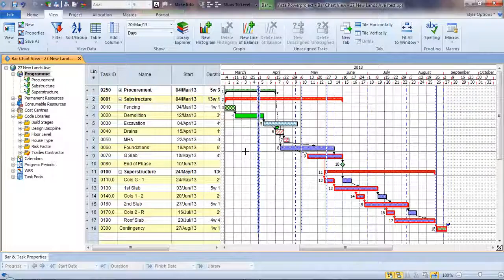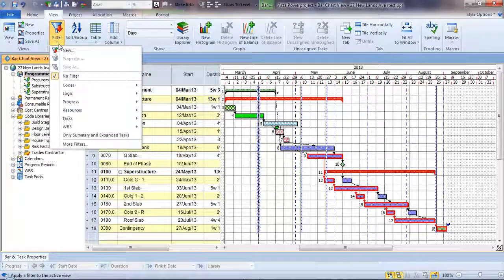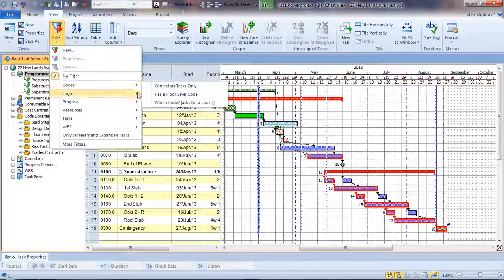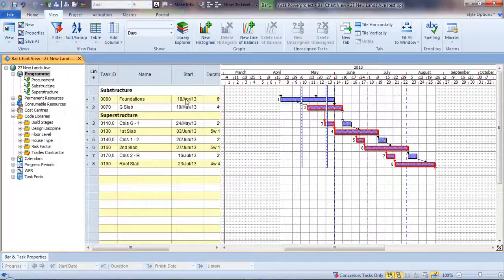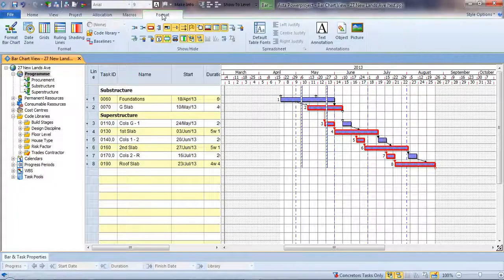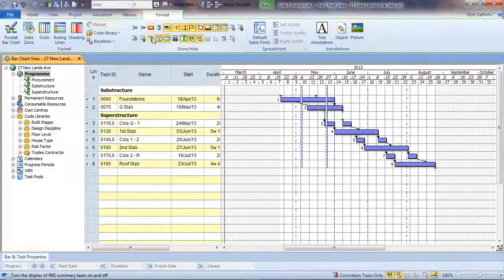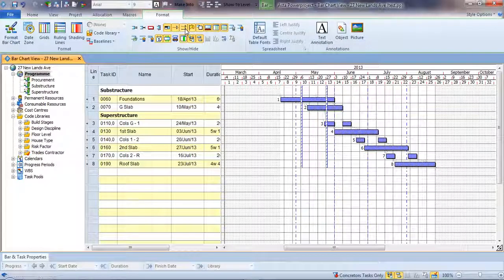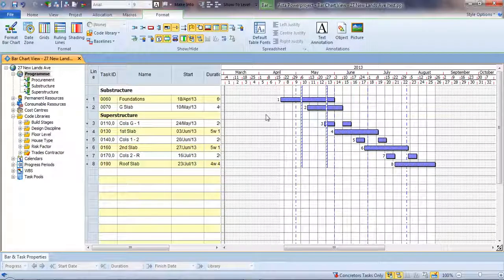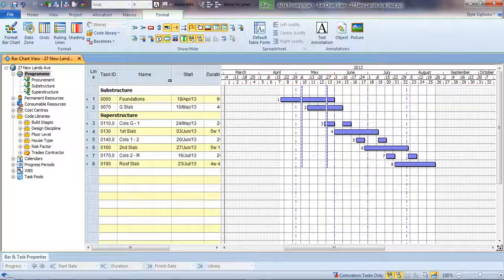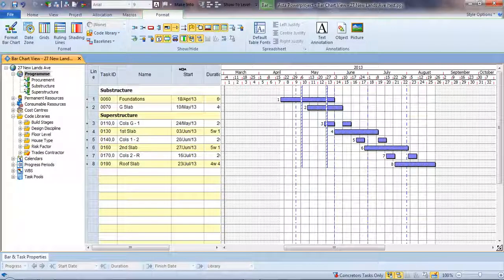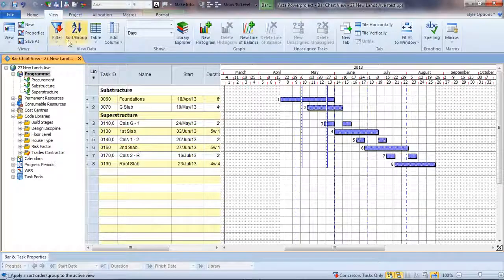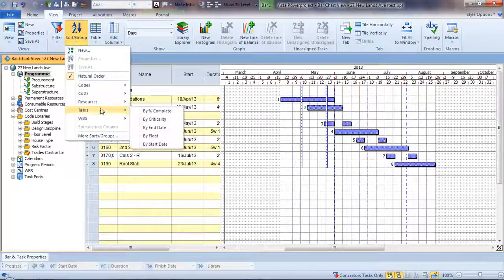With a different table we can also have a different filter. Maybe I only want to focus on the work of a particular trade contractor, so we can filter out only a subset of information. We can choose to change the appearance so we don't want to show the critical path or the logic links. We could also sort it by a different view like start date, for example.